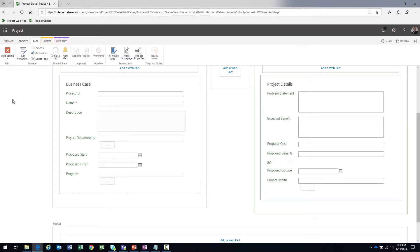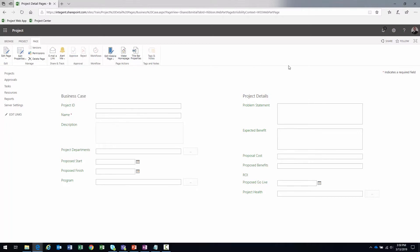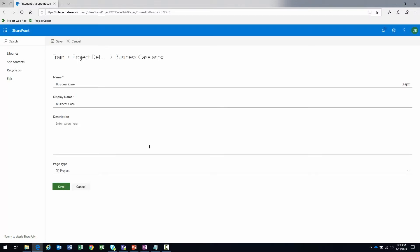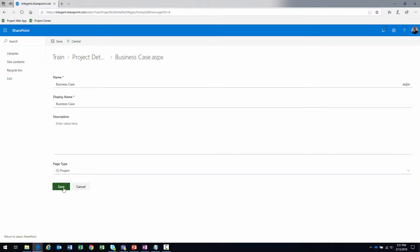I'll click 'OK' to wrap up that web part and then click 'Stop Editing.' One thing I need to confirm: I'll click 'Edit Properties' while still on the page. I want to make sure the page type is set to 'Project,' which allows this PDP to display project information. The other page type options are 'New Project' — for initiating projects — and 'Workflow Status.'